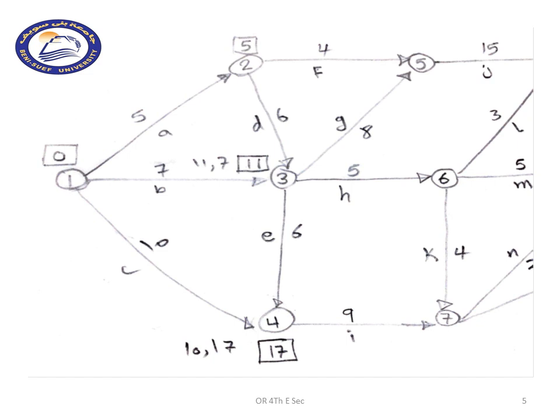The same goes for node number 4. The node is receiving times from activity E and from activity C. The time coming from activity C is 0 plus 10, and the time coming from activity E is 11, as we selected the higher number, plus 6, which is 17. Here there is a comparison between 10 and 17, so we will select the higher duration, which is 17.